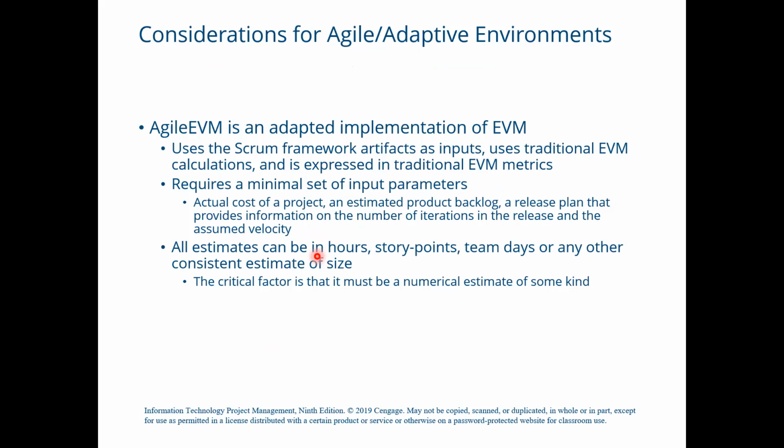Okay, now the considerations for agile and adaptive environments. Projects with a high degree of uncertainty, or those where the scope is not yet fully defined, may not benefit from detailed cost calculations due to frequent changes. Instead, lightweight estimation methods can be used to generate a fast, high-level forecast of project labor cost, which can then be easily adjusted as changes arise. Detailed estimates are reserved for short-term planning horizons in a just-in-time fashion.